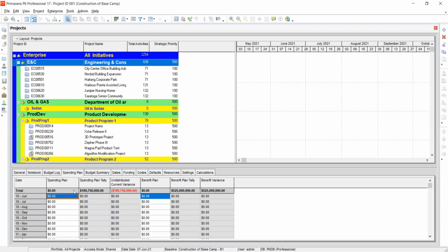The same thing I was talking about here. In this EPS you have selected now, right? You can make a spending plan from EPS. You can also make a spending plan on project, right? Yes. What is the difference? Okay, it's like when I'm on EPS and I select that my budget is going to be $1 million US. Then when I do a spending plan, that in every month I'm going to spend this much, this much, this much.